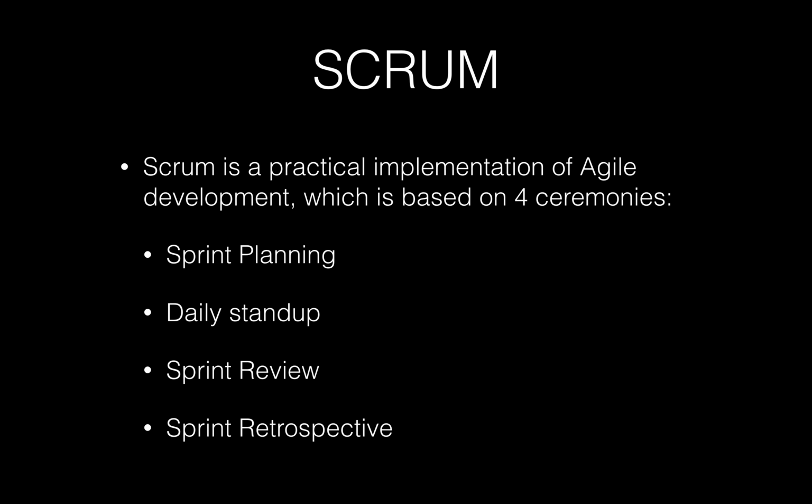We've been doing it every day so far. Daily stand-up, again, I'll go through it in detail, but it's another form of collaboration where every day we meet together and answer a couple of questions, making sure the team knows exactly where all of us stand and what we're doing. Sprint review is then the end of a sprint. So at the end of the week, we show what we've built to the entire team. The team goes through it, sees it, analyzes it, and gives back feedback, like, you know what, we've done this flow this way, but I think it'll be better this way. And that feedback is gathered.